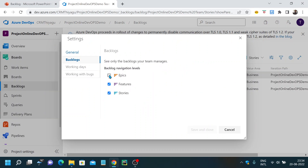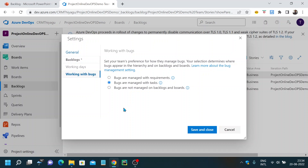One other thing I want to show is working with bugs. Generally, bugs are not added to the backlog in many teams — bugs are something that need to be fixed then and there. They may also not be visible on boards. But requirements vary per team, so you can configure how bugs are dealt with here: bugs managed with requirements, bugs managed with tasks, or bugs not managed on backlogs or boards at all. By default, bugs won't be visible under boards, so this is something to note when working with bugs in your sprints or backlogs.